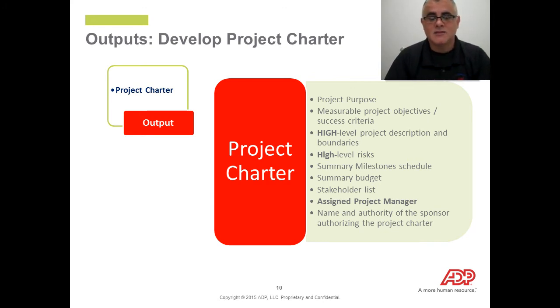But most importantly, it's going to authorize and name the project manager. So another thing about the project charter that is important to know is that it really is the sponsor's responsibility, and he or she will take ownership of the project charter. But as the assigned project manager, you may be involved heavily in creating and participating in the business analysis portion and gathering and conducting the facilitations to collaborate and gather all the information to create this project charter. But the responsibility of the project charter does lie on the sponsor.